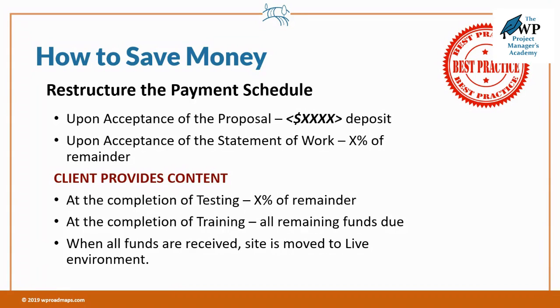We recommend a 2-step proposal process where phase 1 is deep dive discovery. The reason we do that without being more precise is because you can't possibly have all the answers after an hour-and-a-half meeting with the client. You've got to do that deep dive.